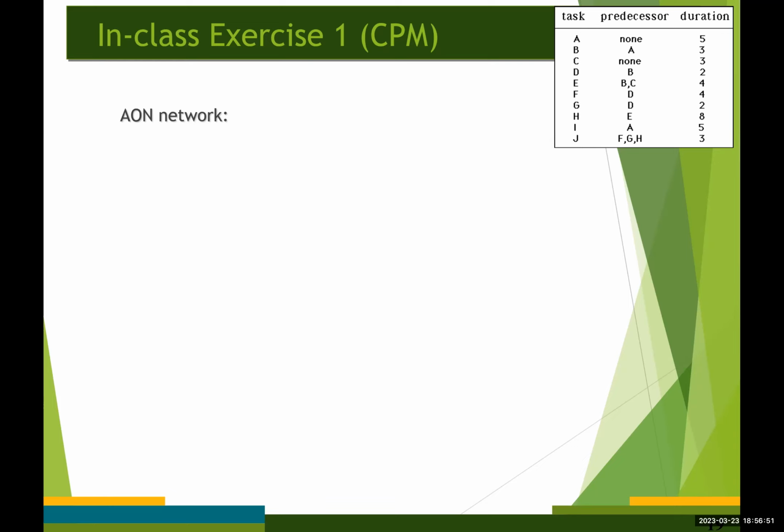Actually, building the AON network is really easy because the AON network does not require any dummy activities other than the beginning and ending nodes.